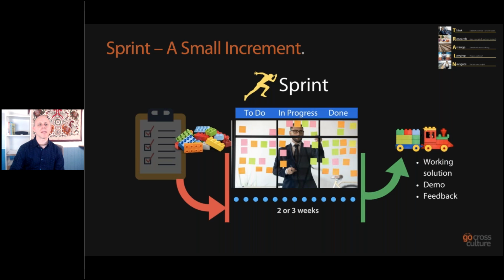So at the beginning, there's nothing existing for that particular functionality. We have a process we call a Kanban view, and I'll show you that on a visual in a bit, about how a Scrum board looks. But you have a concept of to do, in progress, and done. So that means that you have work that's pending. In progress means it's being developed and perhaps tested, and at the end you move it to done. So it's like post-its on a board. You've got a good visual of where stuff is at in the process, and you can track all of that.